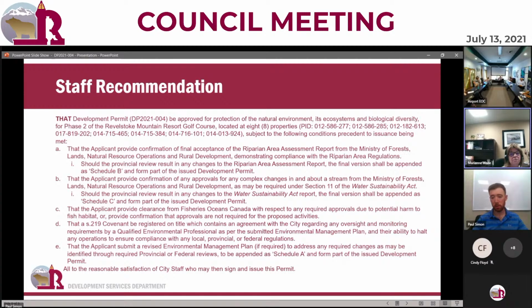No, I'd just like to summarize it by saying that because we do not have a qualified environmental professional on staff, we've gone third party, and those fees would be paid for by RMR as part of the development agreement. And we've been working to ensure that the monitoring of the construction of the golf course, and after it's into operation, that there is a monitoring program in place to address many of the community concerns that we've heard, in particular with water quality and fishes. So we feel we've addressed what we've heard so far.